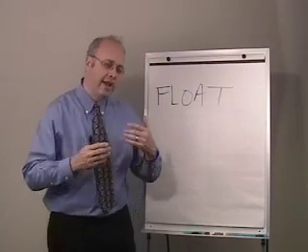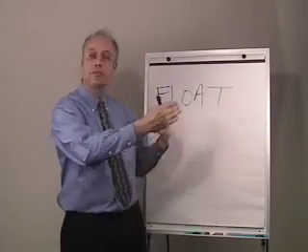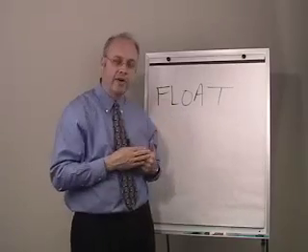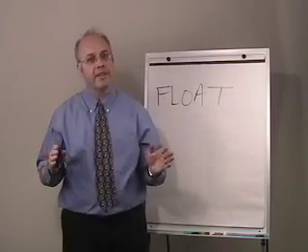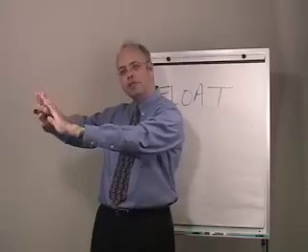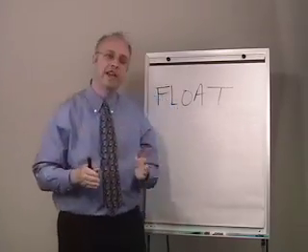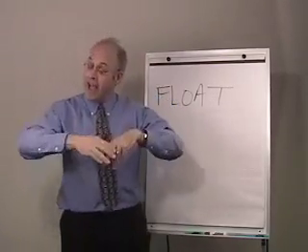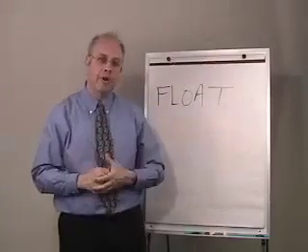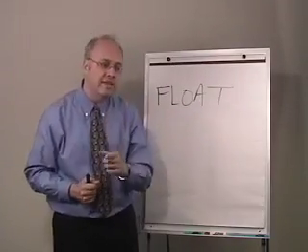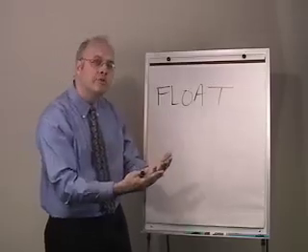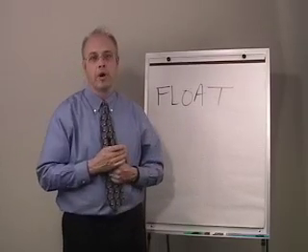So if I delay that path, I'm essentially pushing out the project completion date. Now, if there's a path of work that's making expected progress that's parallel with the critical path, and I push out the completion date of the project, essentially I'm saying I now am going to take more time to build the project, and that may mean that I've in effect given float to non-critical work.